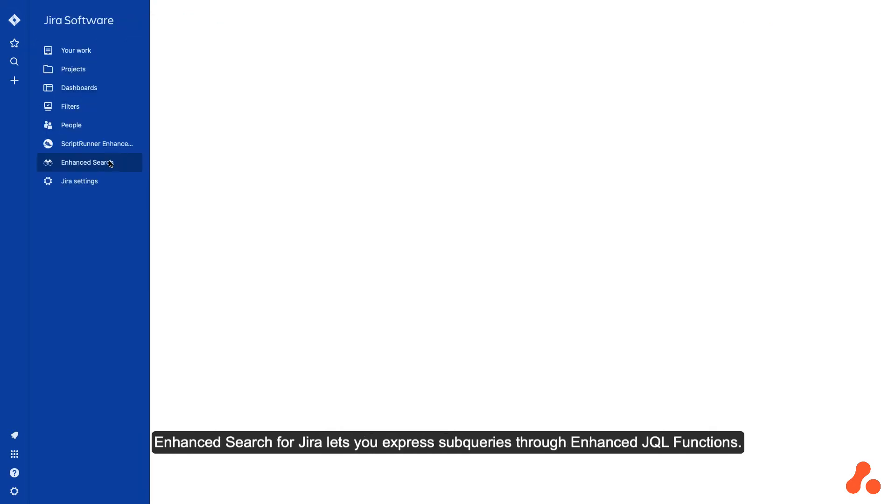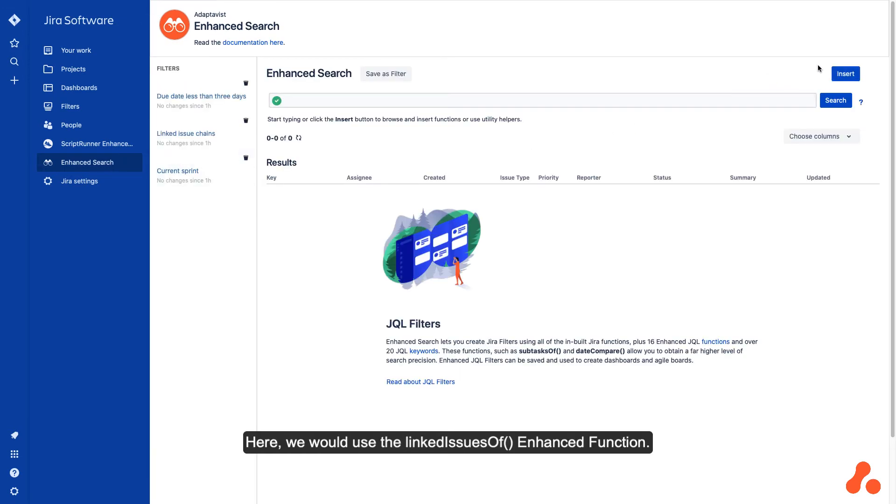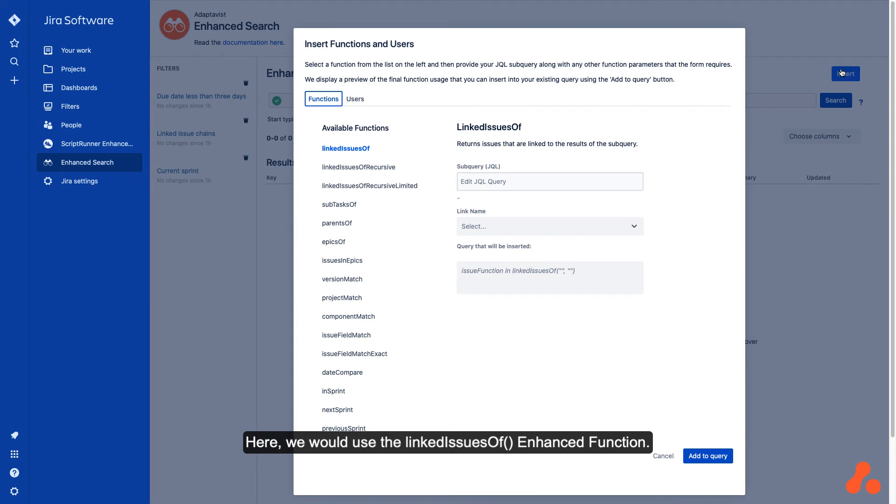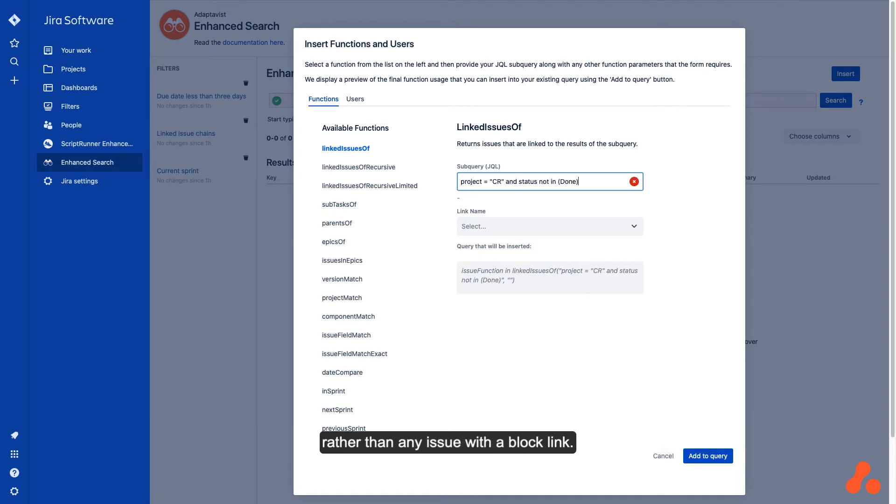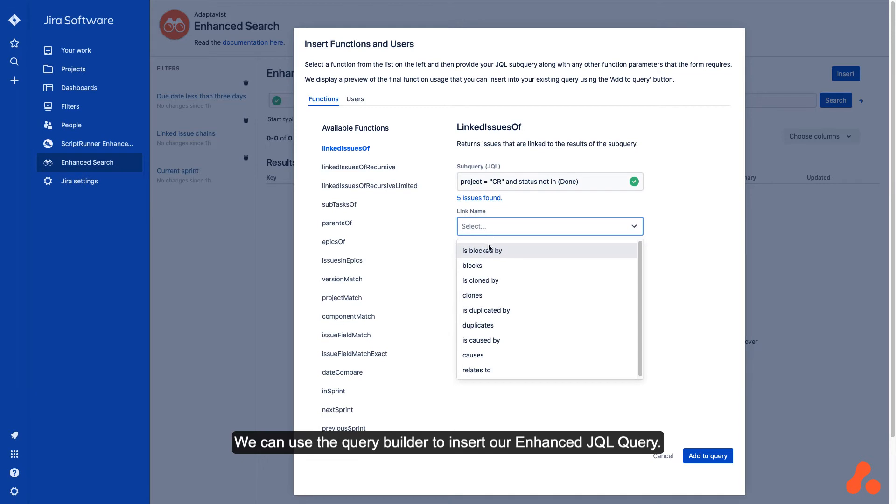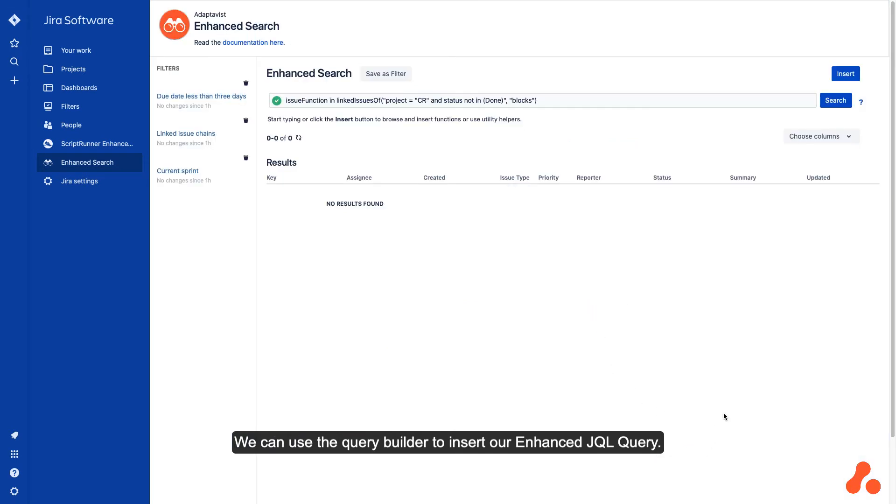Enhanced Search for Jira lets you express subqueries through enhanced JQL functions. Here, we would use the linked issues of enhanced function. The issues returned are those that are currently blocked because their blocker issue is not complete, rather than any issue with a block link. We can use the query builder to insert our enhanced JQL query.